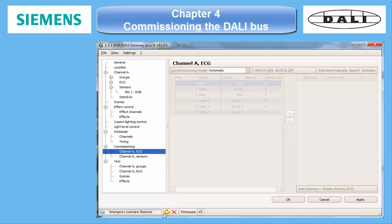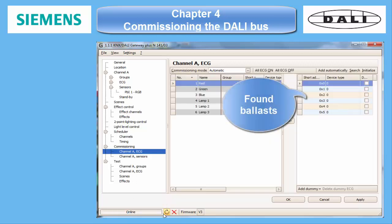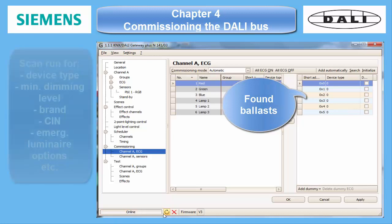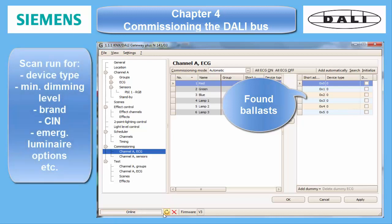If it also doesn't resolve on the second run, the problematic hardware must be replaced. During this procedure, the program also retrieves the ECG's properties like device types, minimum dimming level, brand, CIN, etc.